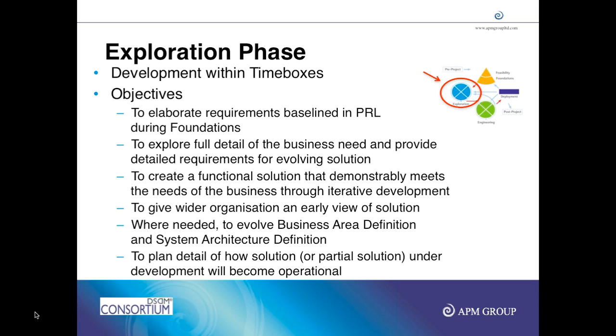Then once we check the terms of reference and make sure it is understood and defined, we go into the next phase, which is feasibility, where we investigate whether the solution is feasible, whether we have enough funding, and if it is good enough from a business point of view. As a result, we prepare a feasibility assessment, which tells the technology feasibility as well as business feasibility and management feasibility. And then we prepare an outline plan which says how the foundation, that is planning of the project, will be done.